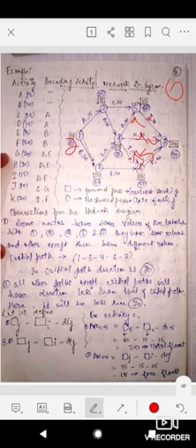See, now one interesting thing is that inside the circle we have 25, and here inside the circle is 20. 25 minus 15, we will get 10 here. 20 minus 20, it will be 0. I have told you earlier that for backward pass we take the minimum of the values. So minimum is 0, that's why I have written 0 here. For forward pass, when you move like this, you will take the maximum value at the node, and for backward pass you will take the minimum value at the node when you come backward.